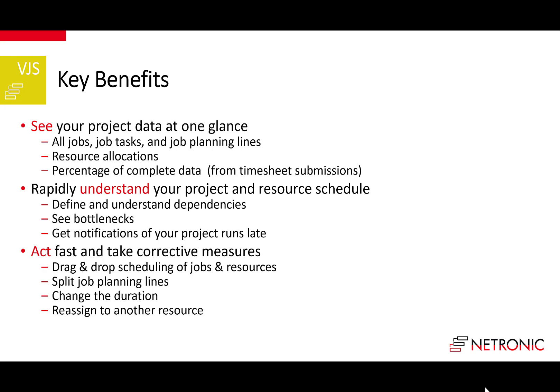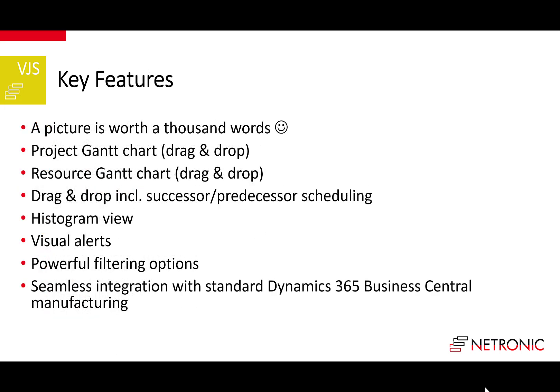The VJS is built on the standard Business Central jobs and resource planning modules and provides a fully integrated drag and drop scheduling frontend. The biggest feature is that it gives you a picture of your schedule - a picture is worth a thousand words. It comes with a project Gantt chart and resource Gantt chart that allow drag and drop scheduling. You can choose drag and drop scheduling that includes successor predecessor scheduling. The histogram view gives you capacity utilization overview. The VJS provides visual alerts, powerful filtering options, and seamlessly integrates with standard Dynamics 365 Business Central.